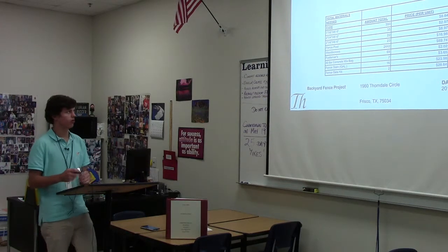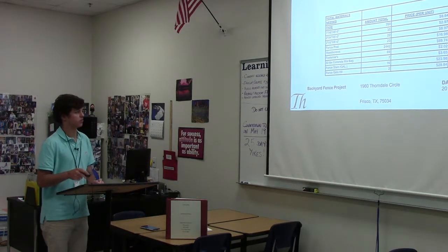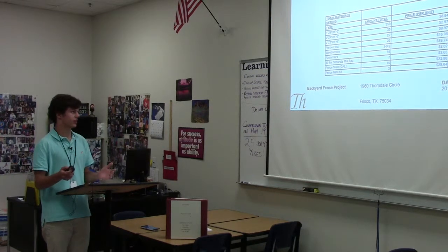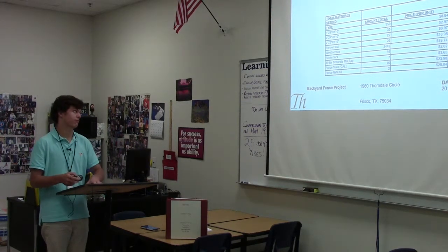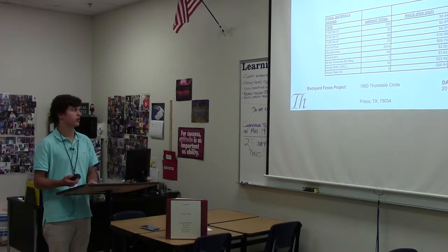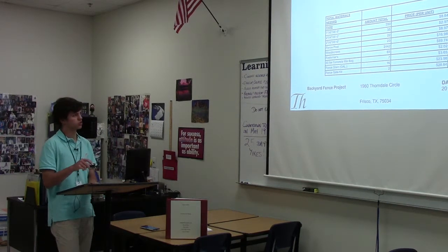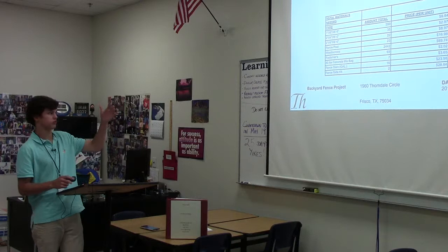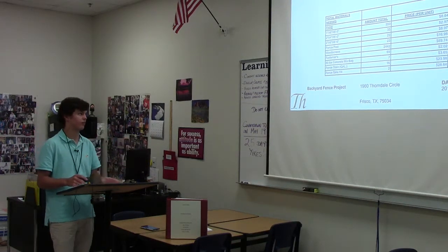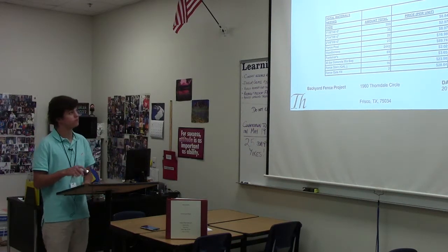This is my materials page. It just shows what all is going to be needed. Instead of just going over everything that's needed, you have to calculate everything from the screws to the fasteners, concrete mix, paint gallons, everything. This shows the price per unit, just to give a good idea of how much everything is going to be.